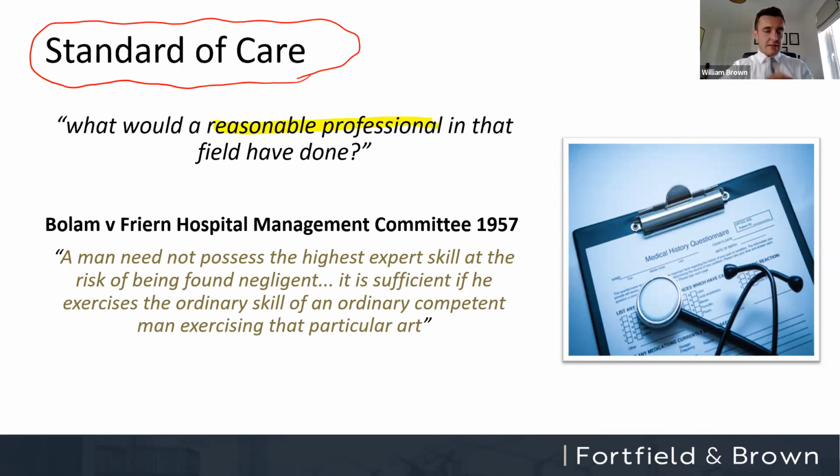What would the reasonable professional in that field, in that industry have done? You will commonly see this standard referred to as the Bolam standard, and it comes from this case here, Bolam and Friern Hospital Management Committee. I've got a little extract from the judgment there, which I think illustrates this point quite well. It's not about the perfect consultant, it's about the reasonable consultant. It says that a man or woman need not possess the highest expert skill at the risk of being found negligent. It is sufficient if they exercise the ordinary skill of an ordinary competent person exercising that art. Again, this was a clinical negligence decision about a doctor.